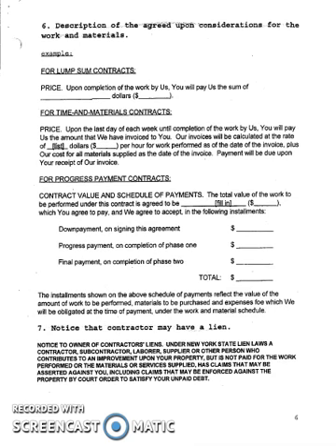So number 6 is the description of the considerations for the work and materials. More or less, this is the payment schedule, the payment terms, how the project will be paid out. We have, in this example here, 3 options, which would be lump sum, time and materials, and then progress payments.